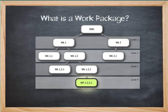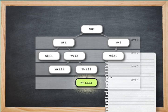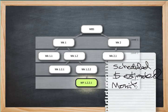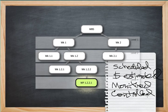So, what is a Work Package? According to the PMBOK Guide, the lowest-level WBS component has four specific characteristics: the work can be scheduled, cost-estimated, monitored, and lastly, controlled. You know you've got something defined at the lowest level as a Work Package if those four characteristics hold true.